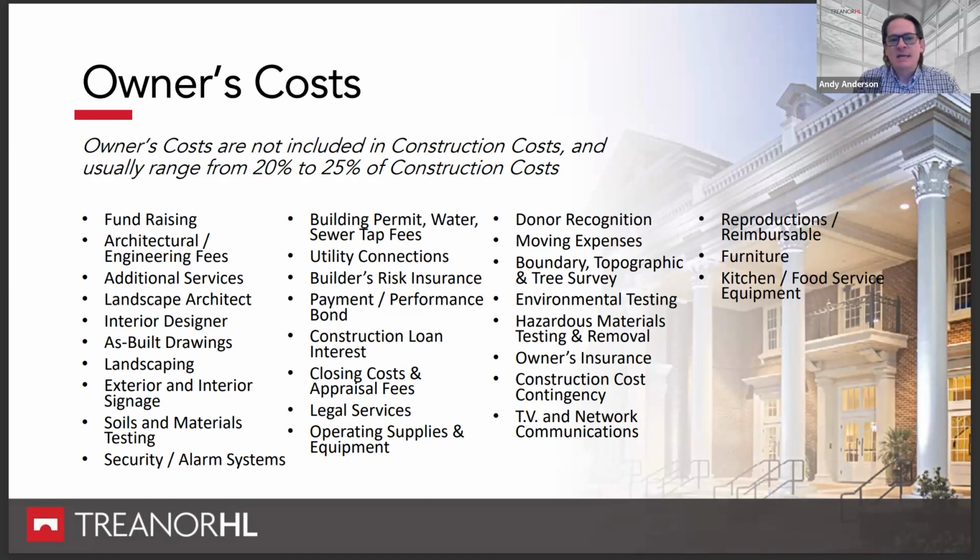Projects inevitably have creep in not only schedule, but in scope and costs. And a lot of those things are unpredictable, and they're not always easy to plan for. Nobody's perfect in this industry, not you, not us, not the contractor. So there are going to be things that happen where you're going to need more money than you thought. And so maintaining an adequate construction cost contingency above and beyond what your budget is will allow you to plan for those inevitabilities.